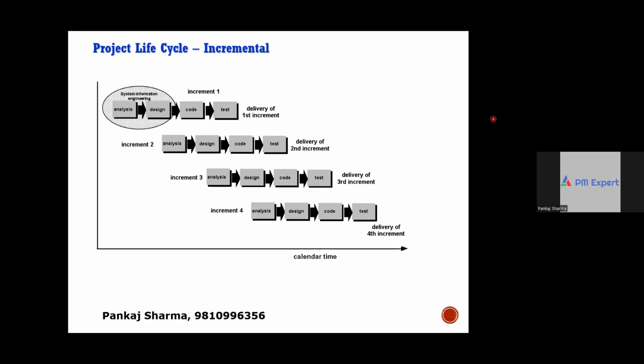The planning horizon can vary from 3 to 5 months or 2 to 5 months, right? But in projects where the level of uncertainty is very high and complexity is very high, the planning horizon can be a 4 week period, a month period, or a 2 week period, right? So first we'll talk about those projects where there is an uncertainty.